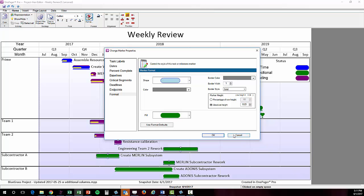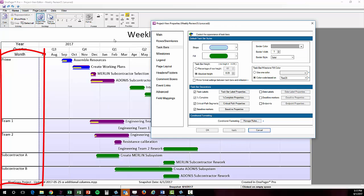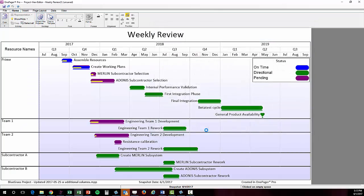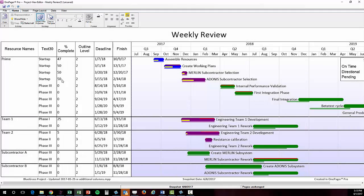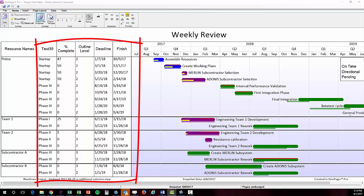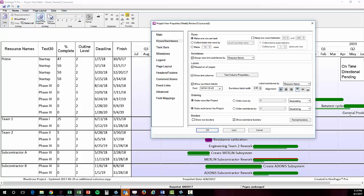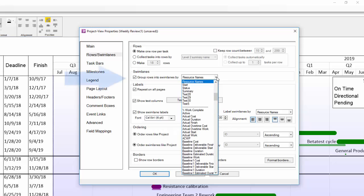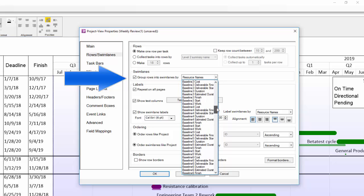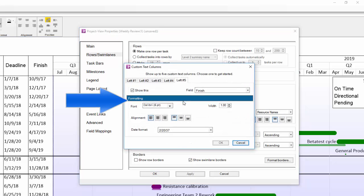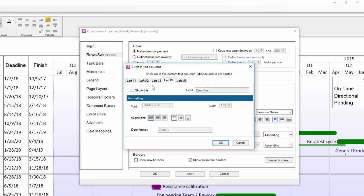OnePager can group your tasks and milestones into swim lanes using any column of data in your source file. Right now, you can see mine are grouped by my resource names column. Additionally, OnePager can display up to five columns from your source file to the right of the swim lane column. To change what columns from my source file are driving the display in my swim lanes and other columns, I click into the project view properties again, then go to the rows and swim lanes tab.